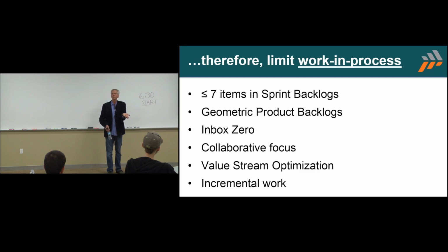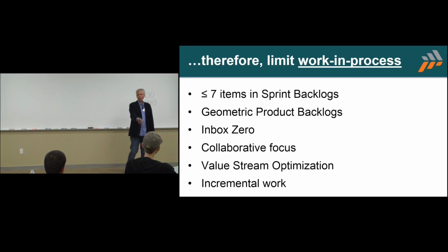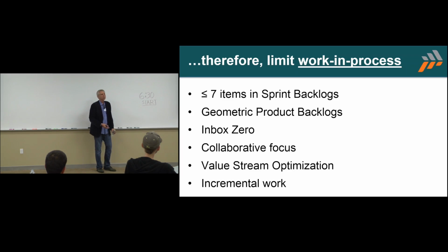What do you do at the end of the sprint? You can demo it. Release. That's a good thing. Release. That's even better, right? If you demo it, you still have work in process because it hasn't quite made it out to the customer. You release and now it's in the customer's hands. And you know what? We could all quit and it would still be okay because the work is out there. There's no work in process anymore.